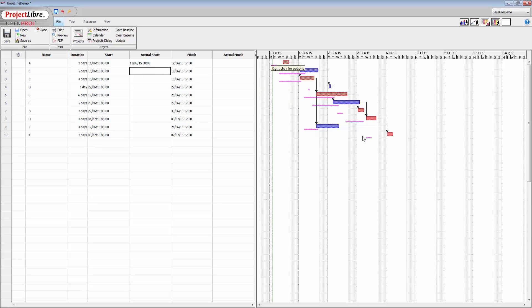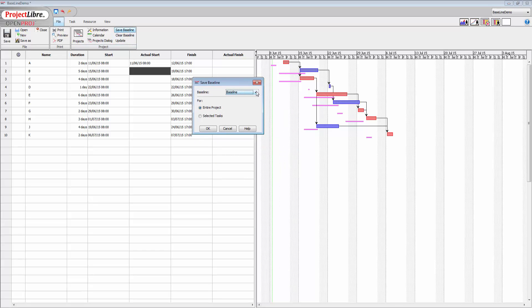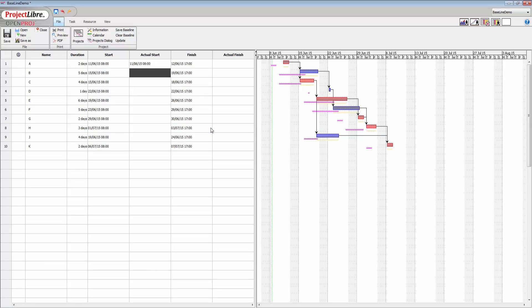So for the sake of argument, say I want another baseline at this point. So I can save another baseline and I'm going to call this one baseline 2 and click OK. You probably difficult to see that but there's a yellow line now underneath all these various items here.